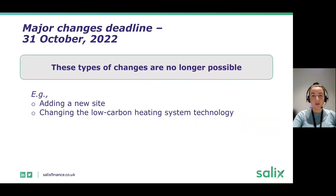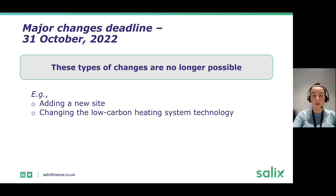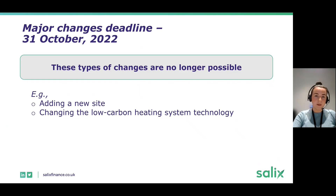The major changes deadline has already passed — it passed on the 31st of September 2022. Changes such as adding a new site, changing sites, or changing the low carbon heating system technology are no longer possible for single year projects due to deliverability concerns by March 2023. For multi-year projects completing in March 2024 or March 2025, major changes are still being accepted.